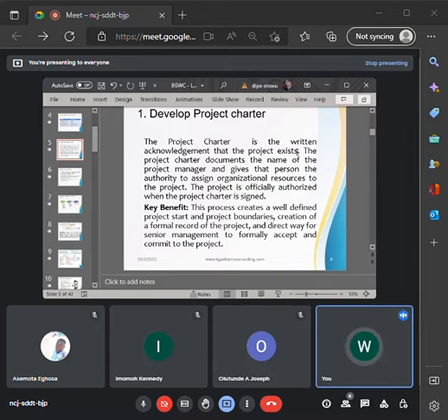And that is the meaning of a project charter. A project charter contains high-level requirements or high-level information about what the project entails. And take note, a project charter becomes official or legal when it is officially signed by the project sponsor. That becomes a project charter.